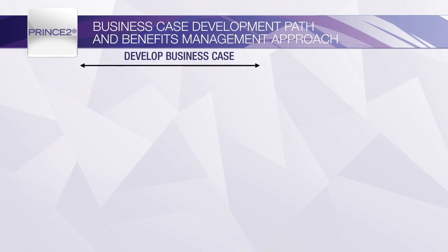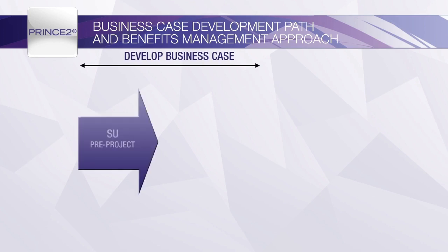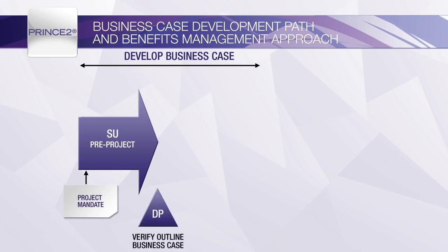The business case is initially developed in outline during the starting up a project process and included as part of the project brief to support the request to initiate the project. The project board will review this information and verify that the project is worthwhile and viable.